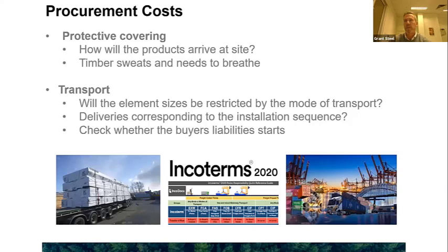What it has meant is there's been quite a significant amount of reconfiguration work, where you have to break down the pack, uncover it, and effectively double handle it to get it back into its correct sequence. So you're introducing more risk of potentially damaging the component, or more opportunity for the components to be exposed to the elements. So it's important, that one.